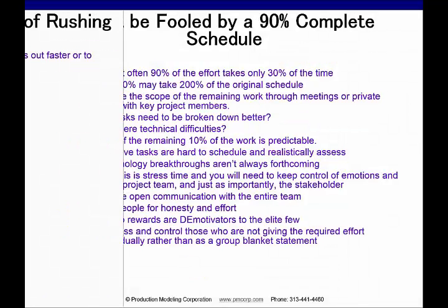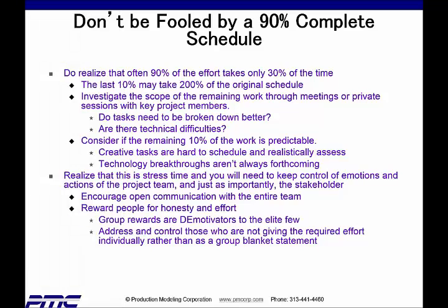Don't be fooled by a 90% complete schedule. Realize that often 90% of the effort only takes 30% of the time, and the last 10% of the effort will take 200% of the original schedule.